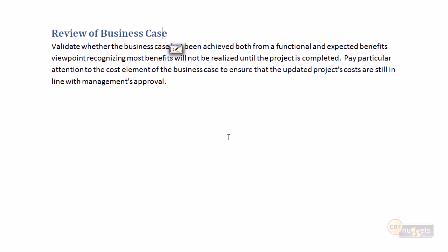The review of the business case is pretty well the same concept that we talked about earlier in the project report. We're validating whether the business case has been achieved from a functional and expected benefits viewpoint, but we need to recognize that most of the benefits, or probably all of the benefits, will not even be realized until the project is fully completed. So therefore, we're still doing that future projection. Based on the information I know now about how well the project is delivering, I still have confidence that the project will achieve all of these benefits, and we need to pay very particular attention to the cost element component of the business case because our project is still in flight.